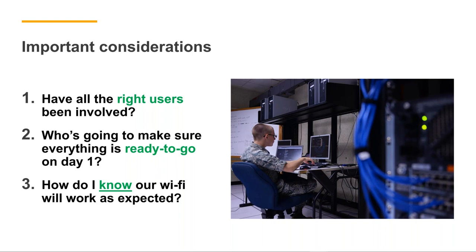One thing that's kind of interesting is we've noticed with some of the partners that we work with, they're not even thinking about IT until after construction is complete. You might think, okay, we know we need wireless in the building. But we've noticed there's a marked difference between the organizations that do the operational planning up front, get all of the laboratory programs up ahead of time, identifying all of their systems, software, and application needs, and making sure that the facility is actually ready to go on day one.